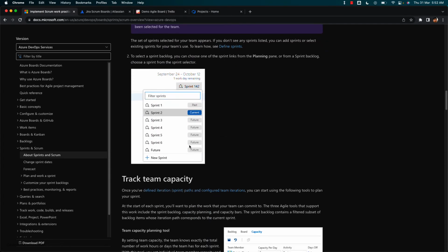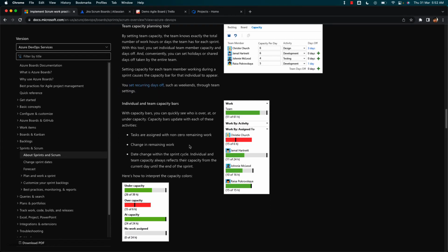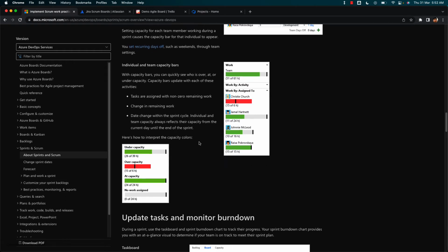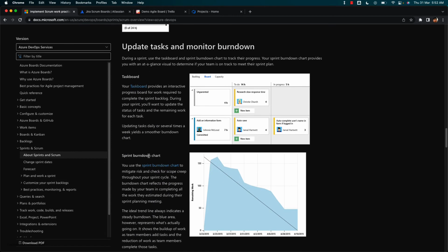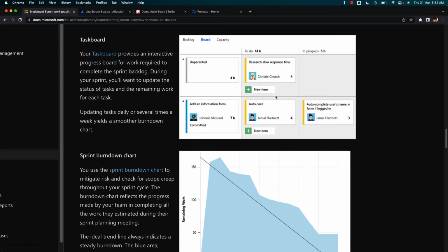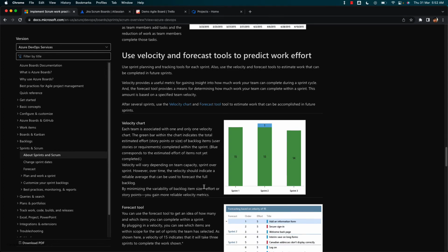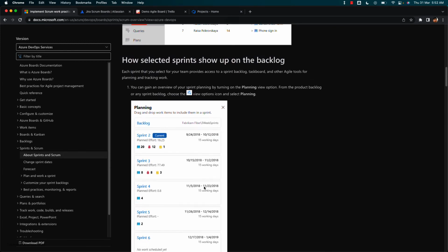Also, you can have various sprints that refer to the fixed boundaries, and then you can have the list of all team members that you can add to them, and how many days they are available per sprint or per month. You can track the list of all tasks that have been assigned and their current status. And you can view the sprint board, which shows you the list of all tasks and their corresponding state. Basically, it shows whether it's in the current state, to do, in progress, and so on. It has many other charts like sprint burndown charts where you can visually track how the team is progressing. So this contains the major, very important feature sets that are predominantly required for running a smooth sprint.